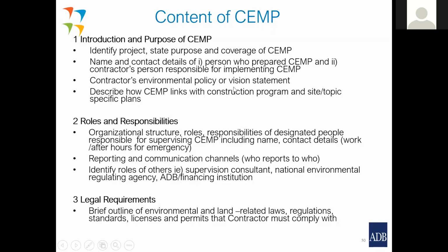So what should a good CEMP contain? And here's just an example of what a good CEMP should contain. Firstly, section 1, introduction and purpose of the CEMP. Identify the project, state the purpose and the overall coverage, name and contact details of the person who prepared it, and the contractor's person responsible for implementing the CEMP. The contractor's environmental policy or vision statement, we want to see that.